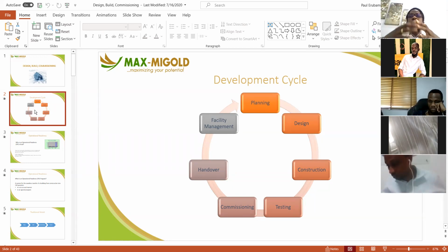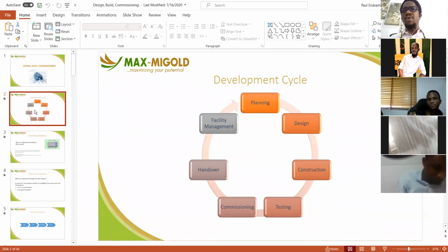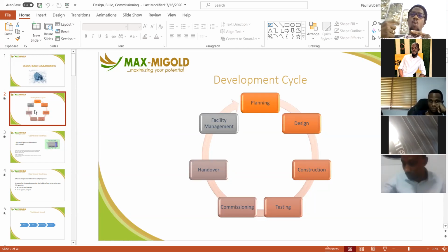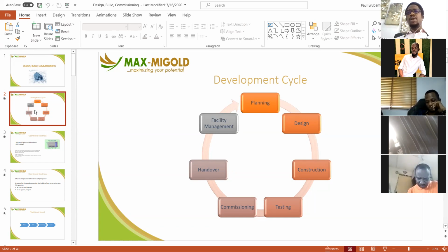First, at the time the work is ongoing, much of the items captured in design drawings will not be at the level of detail that will enable actual artisans to piece things together, like piecing wood together, or putting formwork together to create a certain casting. You now have to start producing workshop drawings that make up what we call construction drawings. So design drawings are different from construction drawings. Construction drawings are more blown out. They are more detailed. They are more work process focused. So that's the one that tells you the specifications of various materials, how they interlink, how materials are worked, and so on and so forth, right?